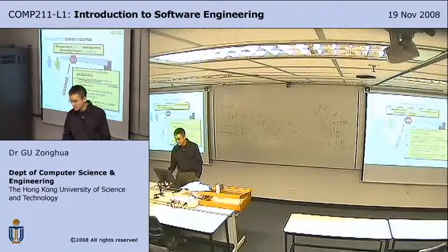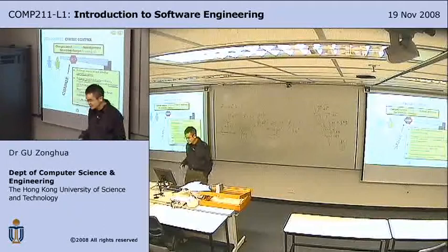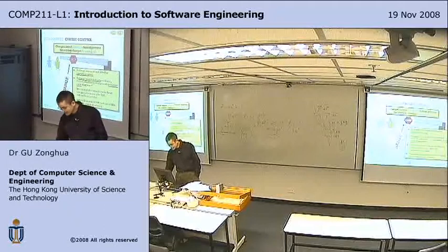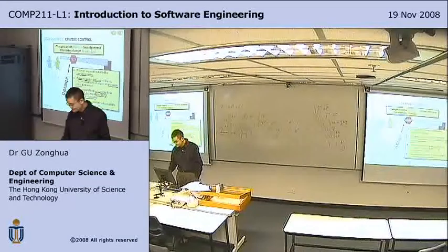A change order is a document that says this change has been approved by the authority: please do the change. And then the configuration item is checked out, changed, checked in after SQA, after the review meeting, and version controlled. It's stamped with a version.